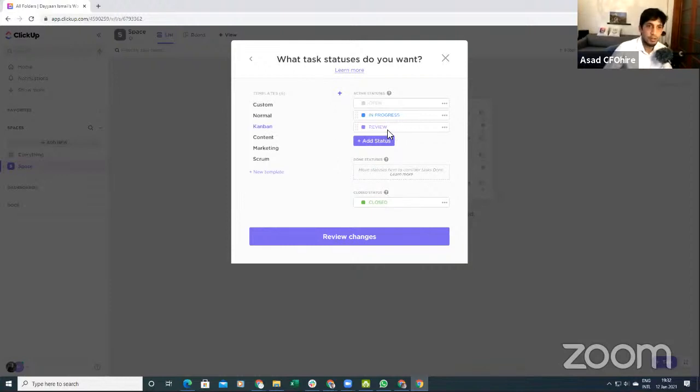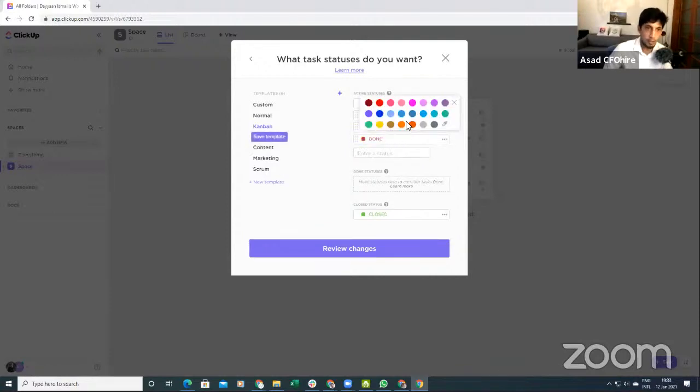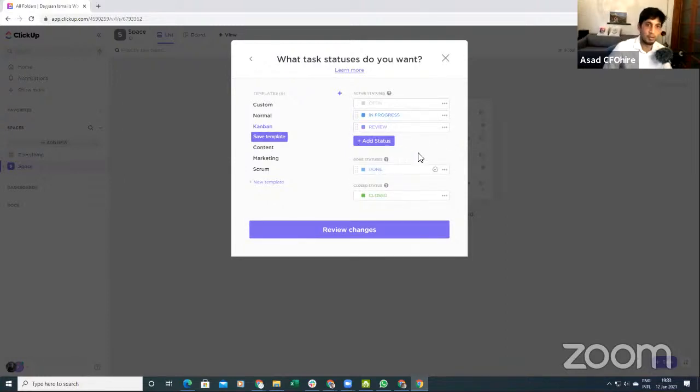In this case, I'll move it as open, in progress, and call it maybe for review, waiting on a manager, and I'll just add something here called done. I'll add a status and call it done. I'll speak about that now, why I keep that as done. Okay, and then I'm going to move that down there. So we've got open, in progress, review, then done and closed. Done means the item is done, but you don't want to close the status in terms of making it disappear. You still want to see it in future. And then you've got the closed status.